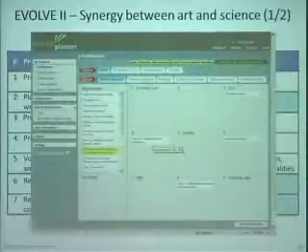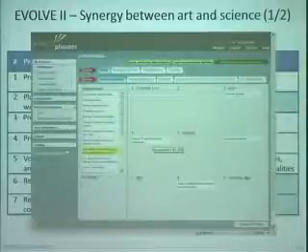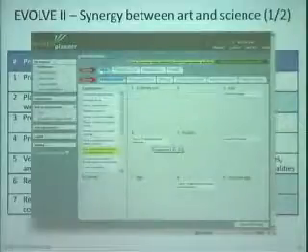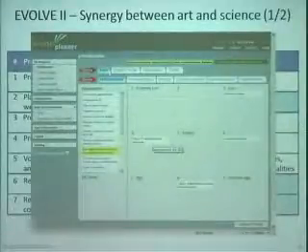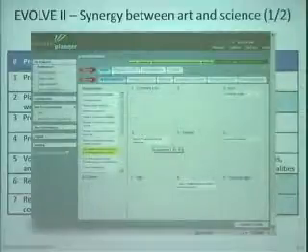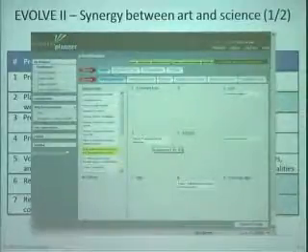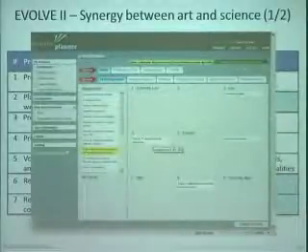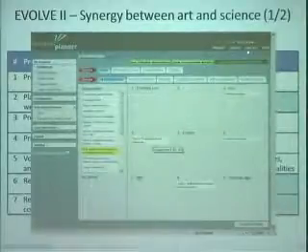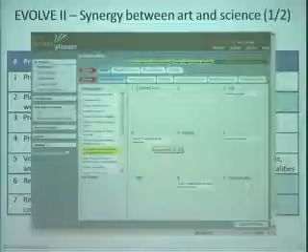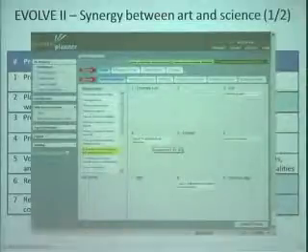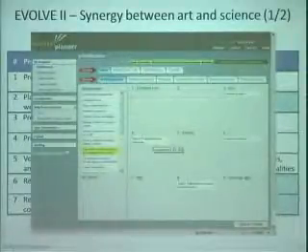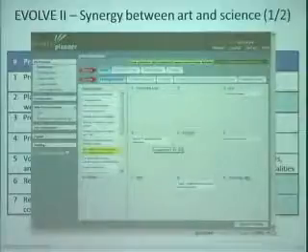So that's something which serves as an input to understand the attractiveness of a feature. And you see here that this is done from different perspectives for different criteria, from value, frequency of use. So these are things you have upfront decided are important for you, and that's why the stakeholders are asked to provide their opinion on that. And you see here also that this is cumulative voting, that they have only a certain amount of votes they can allocate, so to stronger enforce them to differentiate between features, so they are not allowed to classify everything as of extremely high importance.